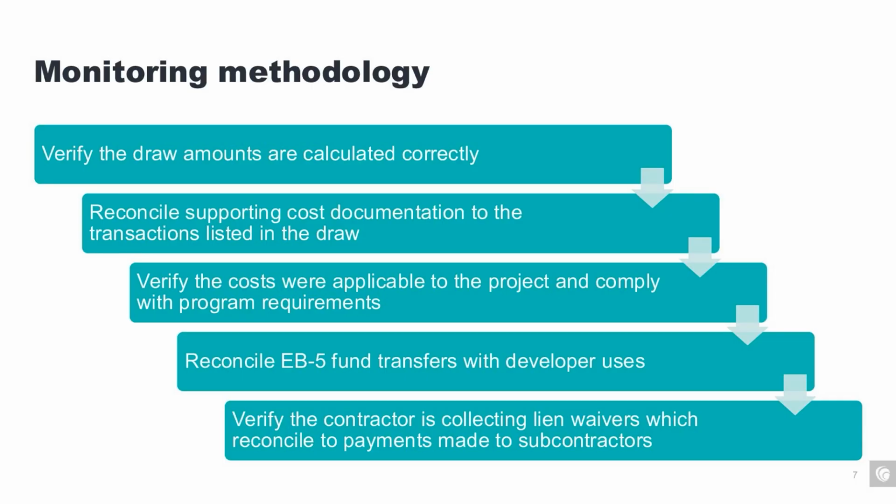From there, we move to reconciling the fund transfers with the developer uses. Certainly, as we now identified that the costs incurred apply to the projects, we need to work with the fund administrator, ensuring that the funds are transferred to the appropriate parties, and that people are getting paid, which leads us right to the lien waiver process.